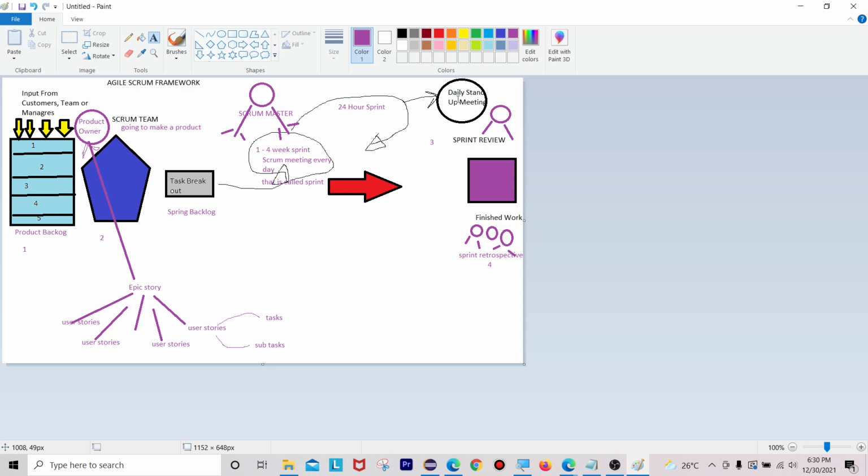So during this scrum meeting you have to answer these three: what I planned to do today, and what I achieved yesterday, and in the current situation, whether there are any obstacles while you are doing your test cases, scripting or anything. If you have any issues or impediments, you have to address them in front of your scrum master. You have to tell all these three at a time only.